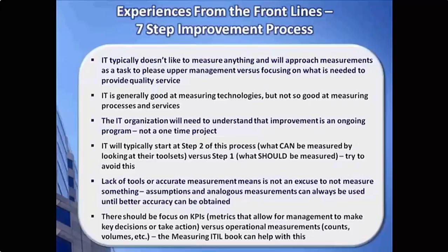As an example, let's take change management. What's important and what I'm looking for in my measurements for change management are when do I need to take actions or make a decision, and I need the metrics to help me decide that. That becomes a KPI. So if I simply send a report to management that says we did, let's say, 3,000 changes this month, all I'm providing is operational information that has no meaning to management. It's not something I can make a decision with.